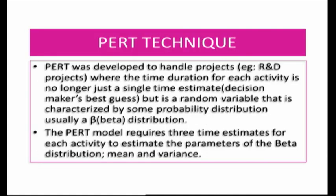This was about the critical path method, where we calculated different floats: the independent float, the free float, and the total float. Let us now understand the PERT technique, which was developed to handle R&D projects where the time duration for each activity is no longer a single time estimate but a random variable characterized by a probability distribution using a beta distribution.